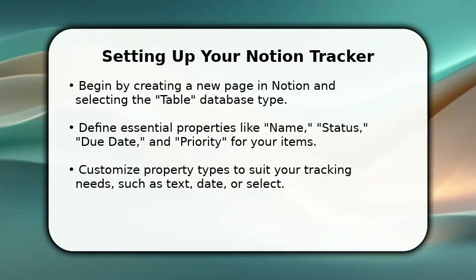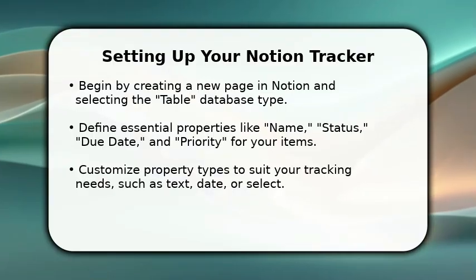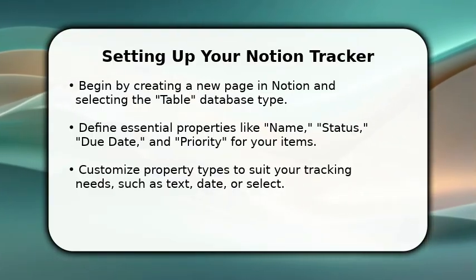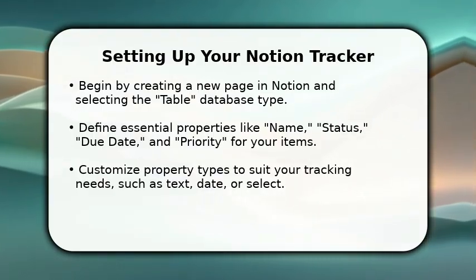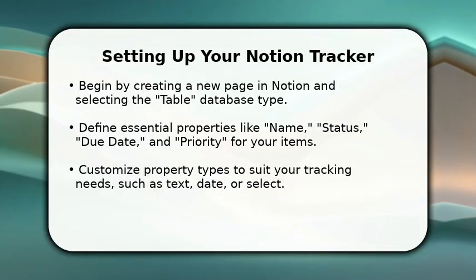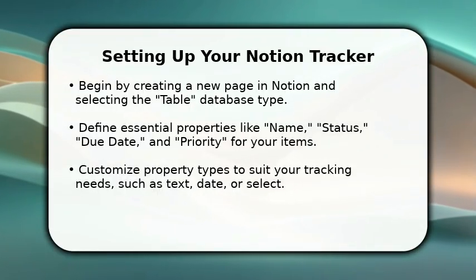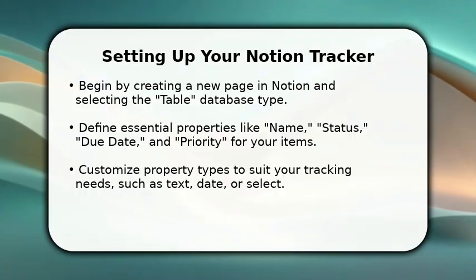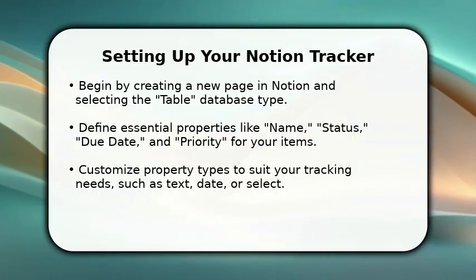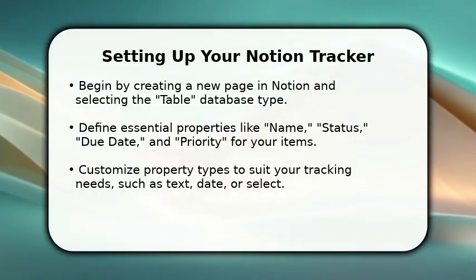In this video, I will explain how to make a Notion tracker. We'll start by creating a new page and choosing the table database type. This forms the foundation of your tracker. Next, you'll define key properties like name, status, due date, and priority to categorize your items effectively.